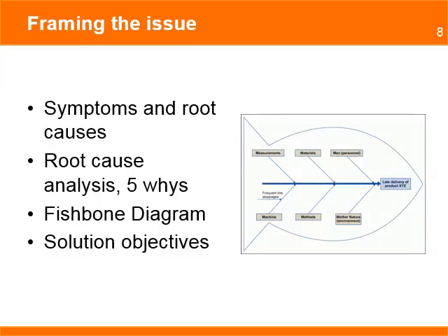Framing the issue means avoiding the error of developing alternatives before there is a good understanding of the nature of the issue. Root cause analysis helps identify the core of the issue and avoids the mistake of developing solutions for a symptom. In this technique, you ask the question why many times to the issue at hand and thus are able to discover the root causes of the issue.